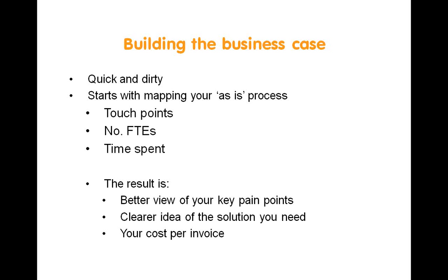You can get quite detailed in this project. Some people literally want to follow a very, very strict Six Sigma or Lean Sigma approach. One company I'm aware of followed the life of an invoice around the world and interviewed people that touched it, so that they could really get under the skin of the process and understand it fully. Obviously that was quite an administrative and expensive approach, but they did come away with a very clear idea of exactly what that as-is process was.